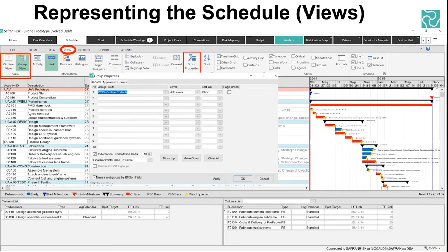So there's a lot of versatility in that, and it actually has some relevance to how you do risk mapping, as I was just alluding to, because it means that you can take an estimating uncertainty value and apply it to everything within a particular geographic region, or you could reorganize your data, slice and dice in a different way, and then map a risk or an estimating uncertainty to everything for a different purpose, for a different reason. So it's very flexible.